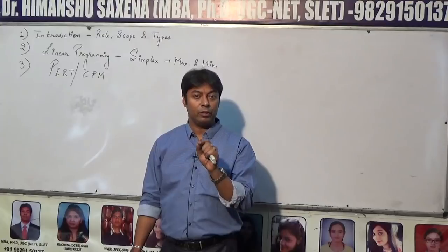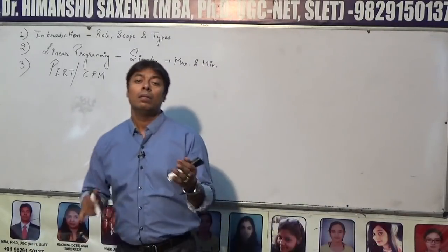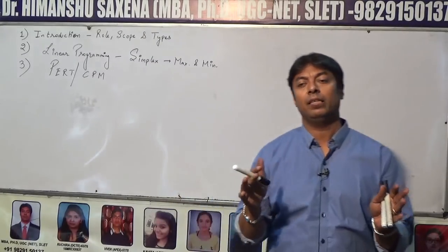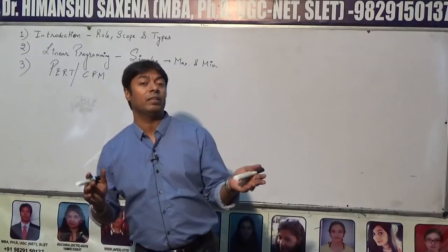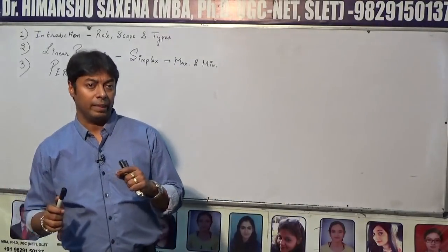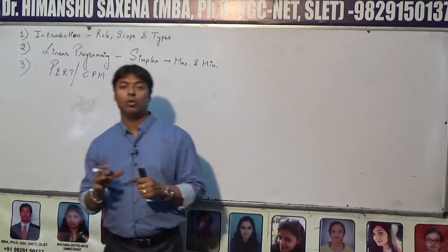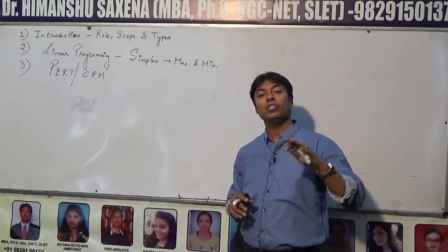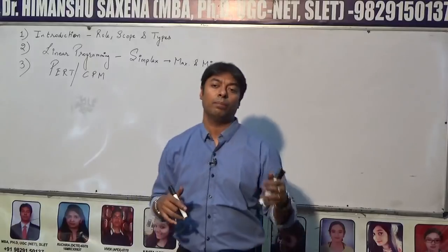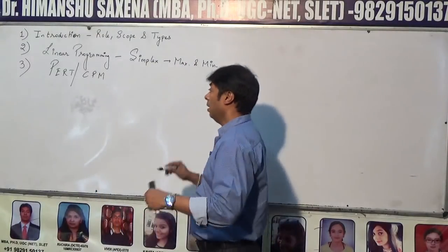PERT makes use of three time estimates: the optimistic time, which is the shortest time; the pessimistic time, which is the longest time for completing the activity; and the most likely time, which lies somewhere between the optimistic and pessimistic. CPM is based on one time estimate. Before executing the project, the project manager identifies the most critical activities using CPM. Practicals on PERT and CPM along with their differences are very important.